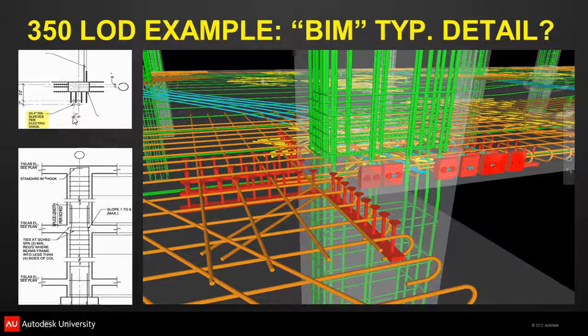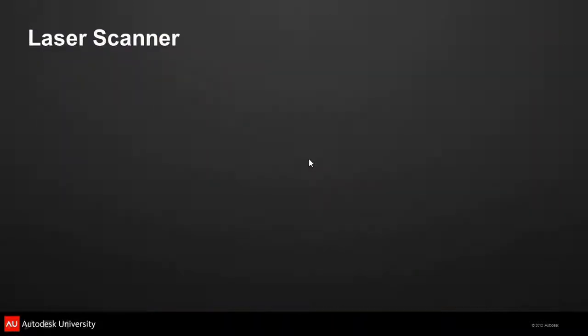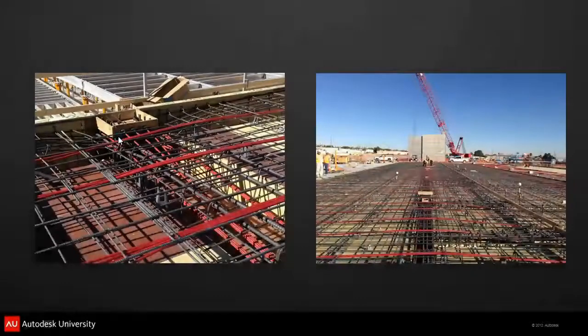But when you really dig into it, you've got tendons and mild steel there, and you don't have enough room to really fit your risers in, your sleeves. This would be a tactical application of laser scanning, and we were doing a mixed level retail building. This one was in El Paso, a multi-level garage with retail above, and it needed a lot of sleeving for the plumbing, drains, and also risers.